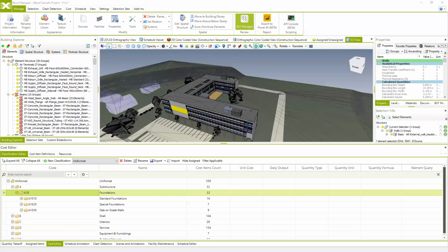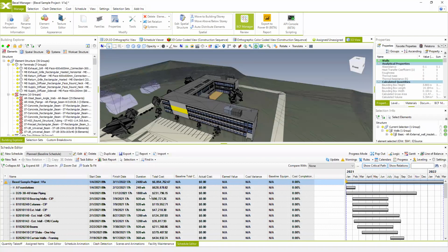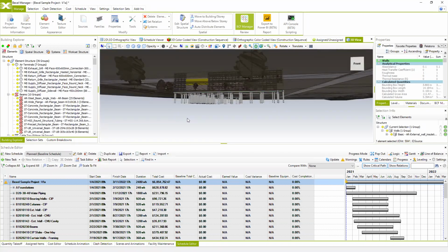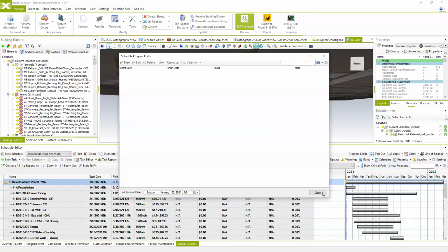How do you manage change to the total cost value and changes in the model schedule? So the total cost value is actually automatically generated based on the progress. So once I input the progress from selected elements and input the real resources which are actually used on site, this is something that I presented in the first example.